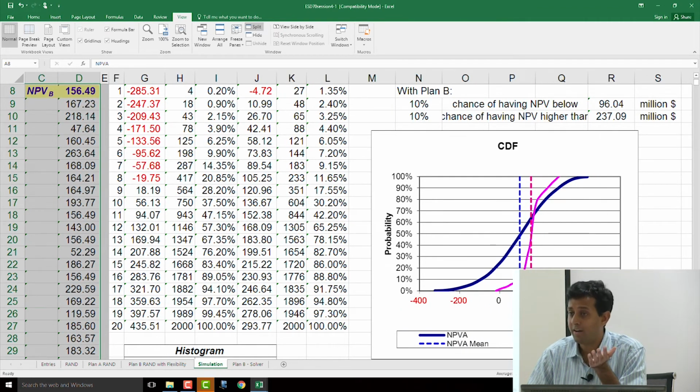Now all of a sudden B is better than A, because now you have exercised that fundamental flexibility which we all intuitively thought made B superior to A, which is, look, if demand isn't picking up, don't throw your money into that project. So there is a scenario where in many scenarios you can go 1, 1, 2. There is actually a scenario where you can go 1, 1, 1.